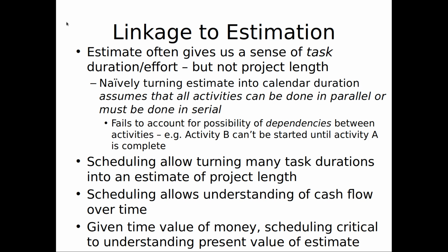Estimates give us a sense of task duration and effort, but we should be cautious about using them for project length. Estimates are used sometimes for that, but really you need to do some scheduling for that. You need to consider what can be done in parallel with what. Scheduling can allow for turning many task durations into an estimate of project length. You have many estimates of the different durations of the subpart projects, you can turn them into an estimate of the whole. Okay?